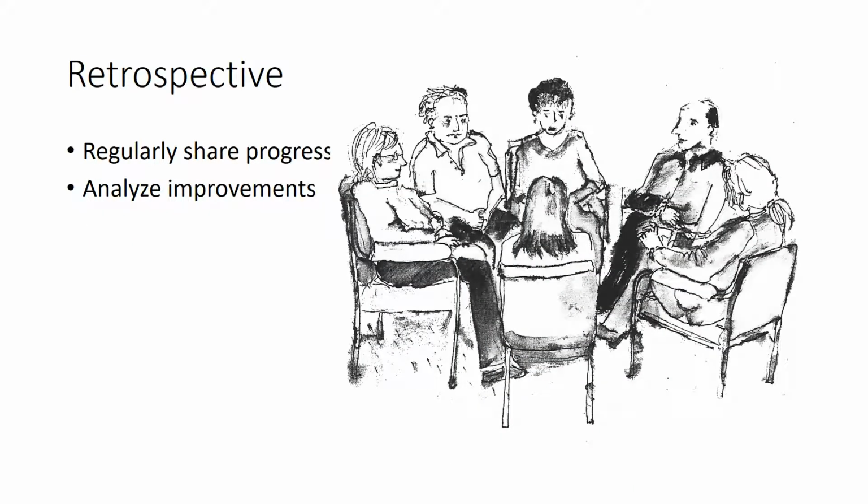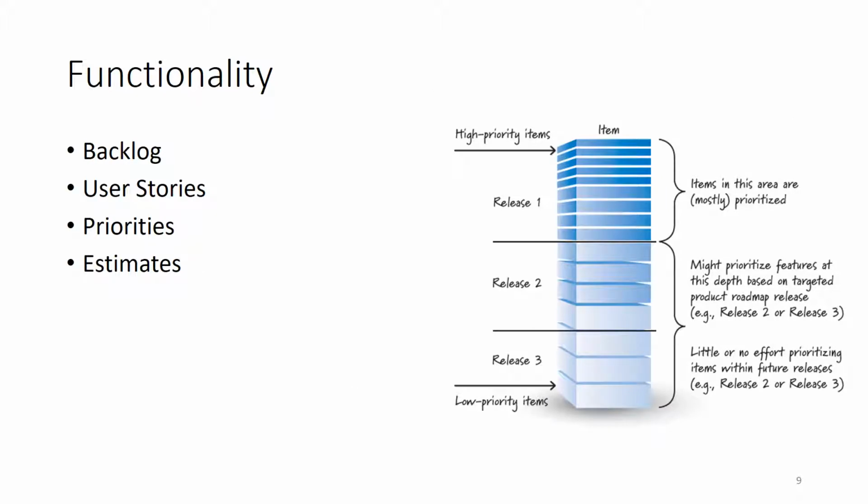At the end of each sprint, or even before, there is a process called retrospective. It means that you sit together after the sprint and analyze what was done well, what was not done well, and what we could do better. This process helps us to improve the performance of the team regularly. It means that after each sprint, we could perform better and find ways to do that.